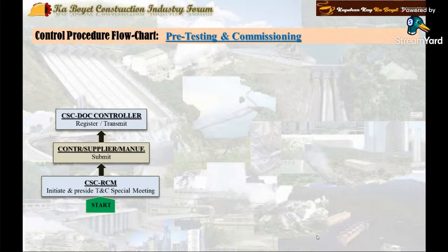Then forward the document submittal to responsible consultant architect engineer for review and verification, simultaneously notifying the consultant resident construction manager of contractor document submittal and formally transmitting to the designer contractor proposed technical testing and commissioning document submittal for review and verification.